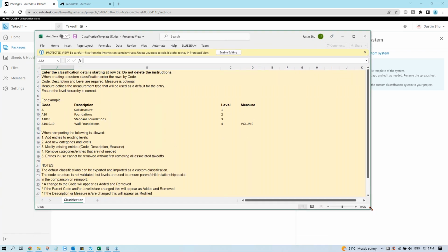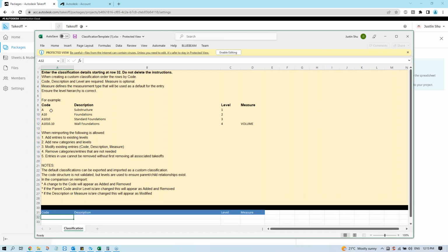So without going too deep into what this is, you will see it's following the same main divisions, major division, minor division, and a sub-minor. So you can take 4 levels of divisions. And here you have a number pointing out which level of division this is. So for example, this is pretty much the first code of the first division. It starts with A, then it goes to A10, then A1010, then A1010.10. So it's expecting these kinds of codes here.